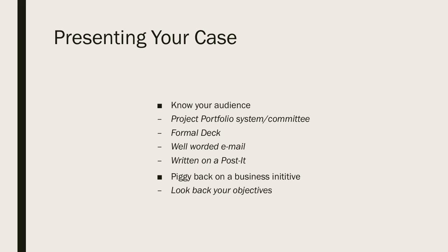You jump onto the business case that the SAP HANA folks are submitting. You have a seat at the table. You have a seat at this conversation. It is perfectly fine for you to piggyback on these projects because you have to support the application after they're deployed. Now, I'm really hoping you guys have some questions around piggybacking on projects that have been